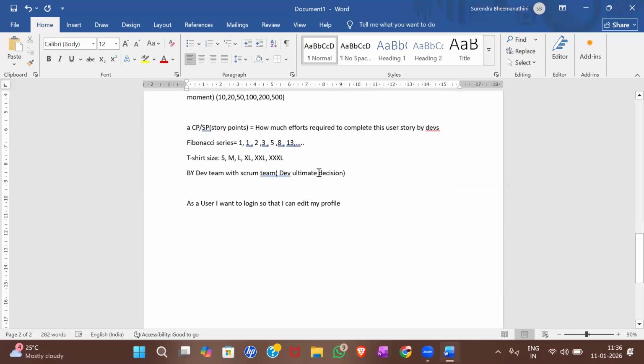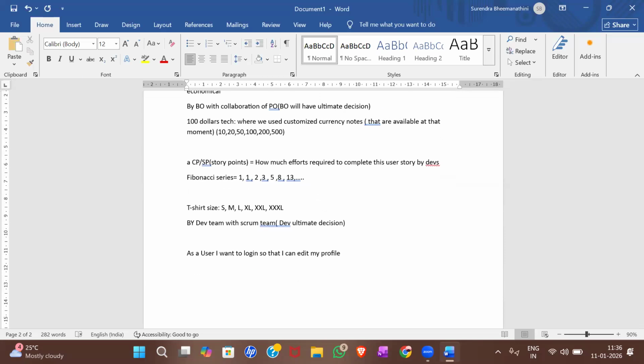Okay. Right. So yeah, most of you got the doubt, right? If Fibonacci series numbers are just numbers, why can't we use natural, or whole, or rational numbers? We have all these kinds of numbers in mathematics, right? So why only choose the Fibonacci series? Why not 1, 2, 3, 4, 5, 6, 7, 8, 9, and all, right? Because if you observe carefully, in the Fibonacci series the gap between two adjacent numbers is higher. Like if you check 5 and 8, you have a gap of 3. And if you look at 8 and 13, you have a gap of 5. So the reason we choose the Fibonacci series is that even though the numbers are adjacent, we can identify the gap of complexity between two user stories.